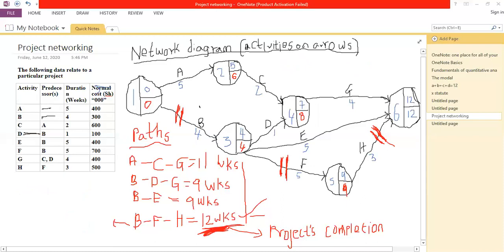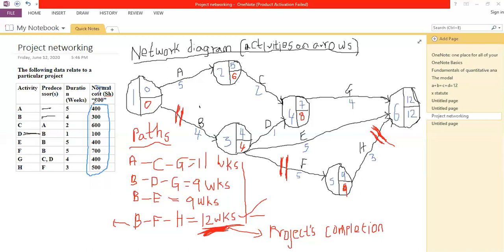But now, as we are representing our work, we would want to know how much it will cost us for this particular project. What you do, you go back to the project itself. For each and every activity defining the project, it has a cost associated with it. Sum over the column known as the normal cost. For example, here we have 4, 3, 3, 7, 13, 14, 18, 25, 9, that will give us 3,400,000. The figures are in thousands.